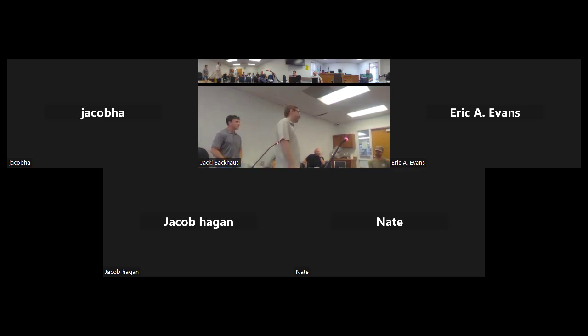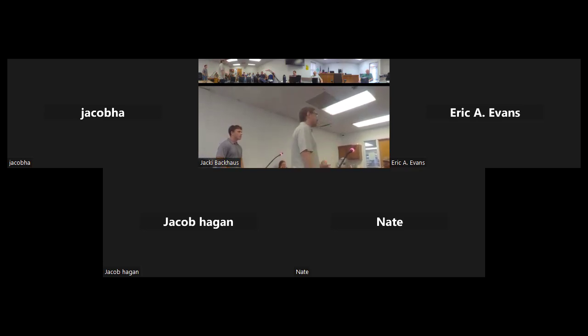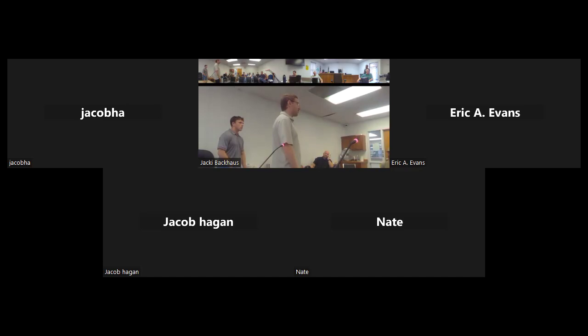Well, hopefully. Does that account for tying everybody else's tile back in to that, all the laterals and all that? Is that right? So we have estimated that, obviously, we don't know all the private tile in the field, so I estimated 50 private tile connections along the run of this ditch.